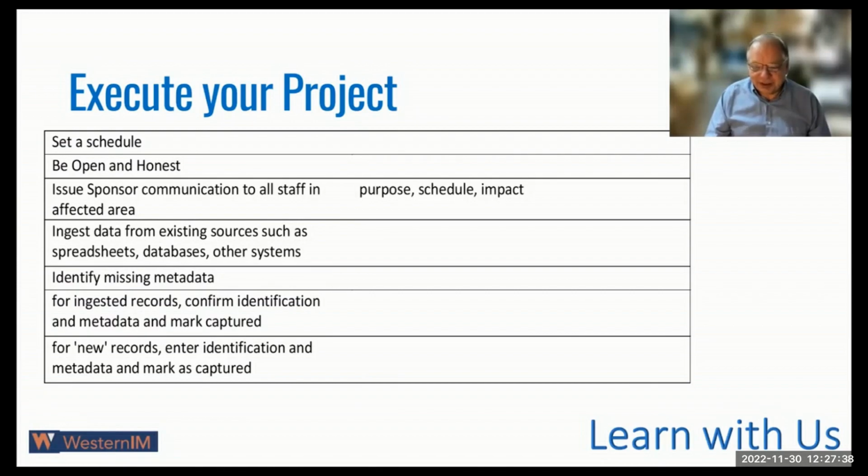And my comment to that would be smart project management says start small, pick an area that has high profile, high value to your corporation, but is small enough that you can accomplish. And as soon as you've done that, of course, you're going to get credibility with your organization. So again, set the schedule, make sure your sponsor communications are in place, and let's go.